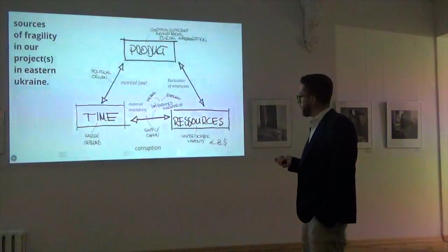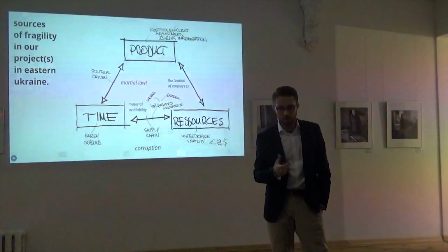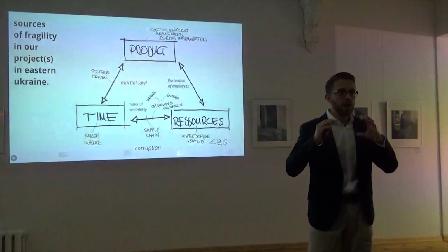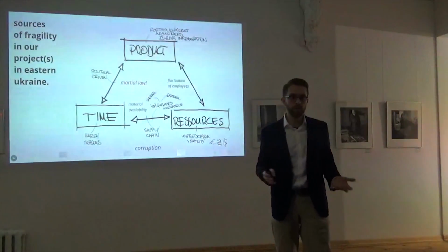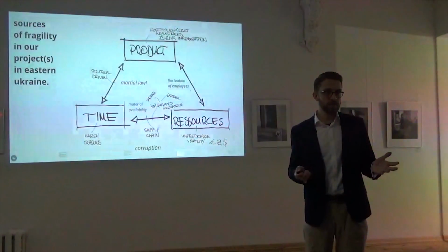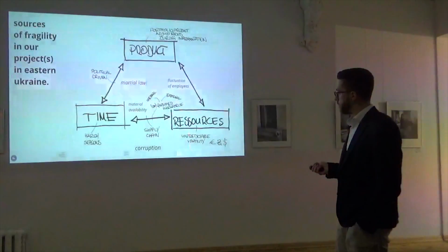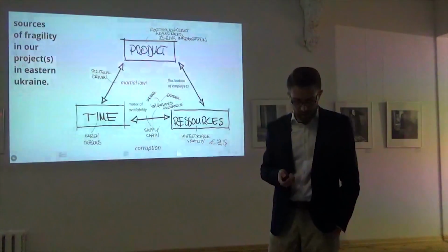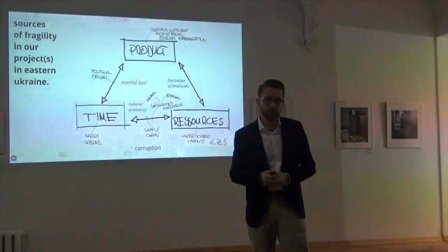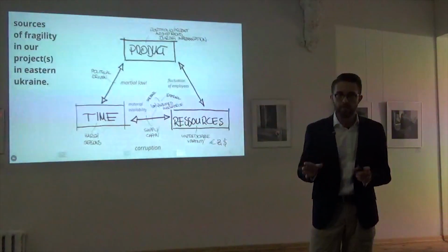That's also the same for the supply chain. Once in a while, we have problems with the products we need for our work. For example, we have maybe just half of the insulation we need, and the other half will arrive in 2 or 3 months, because there is nothing on the market. I think in Kiev, I hope it's a better condition of the market, but in Dnipro it's not good at all. So we have a problem with volatility, of course. For us it's not that risky because we can calculate it somehow. We have some risk management, but it's a problem for the construction companies, and therefore, if they have a problem, of course, we will have a problem.